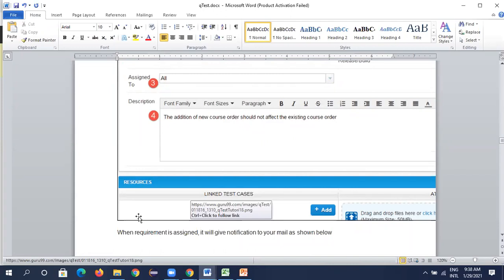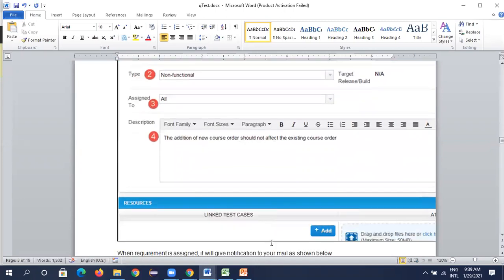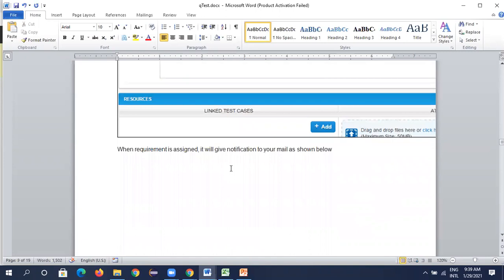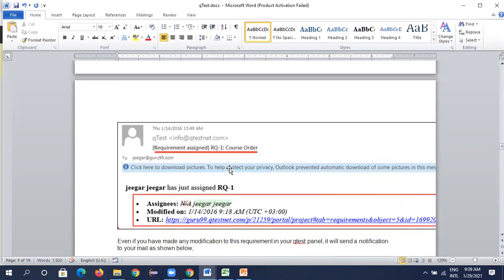This is what is called the requirement traceability matrix. So after you complete the project, you see all the test cases are linked to the requirements. If they are linked to the requirements, then you have covered all the requirements. Your manager, team lead, or product owner will design the requirements and add them here, and you need to map each and every test case to the requirement and make sure all test cases are passed, and all requirements have been assigned.